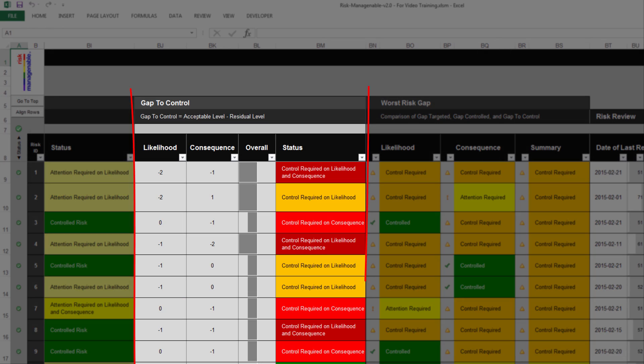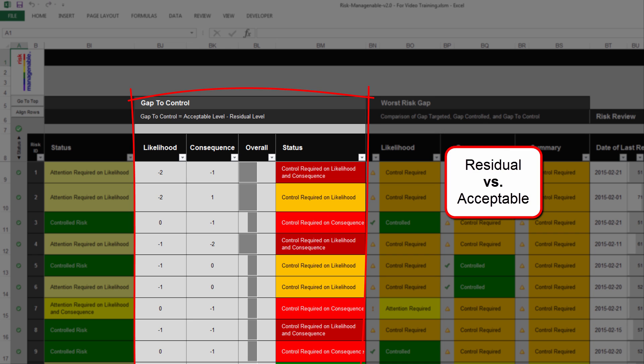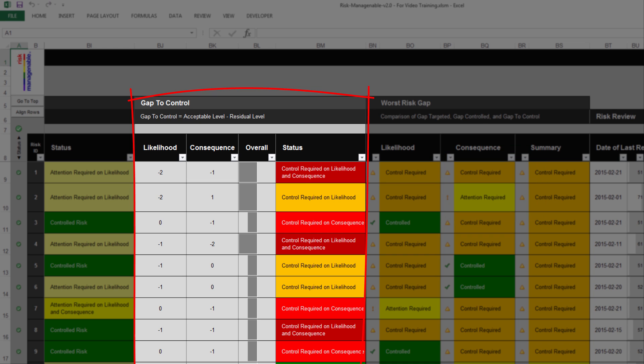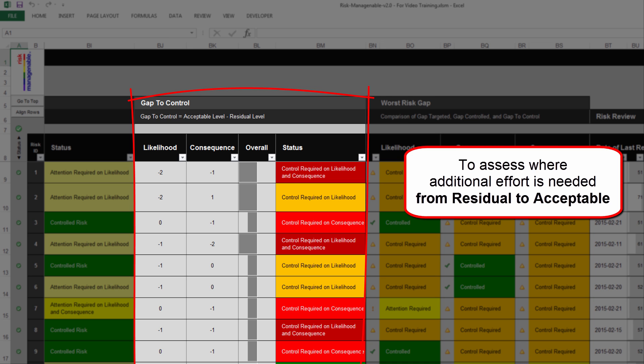The section Gap to Control is automatically calculated and color-coded based on the settings in the Risk Parameters tab. This section compares Residual Risk Levels and Acceptable Risk Levels, displaying explicit information on the gap which still needs to be addressed for the likelihood and consequence of the risk. This feature will save you a huge amount of time when assessing where additional effort is needed to reach the acceptable target levels.